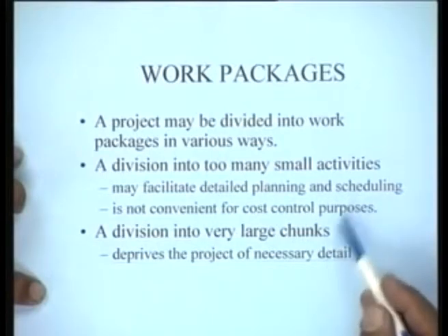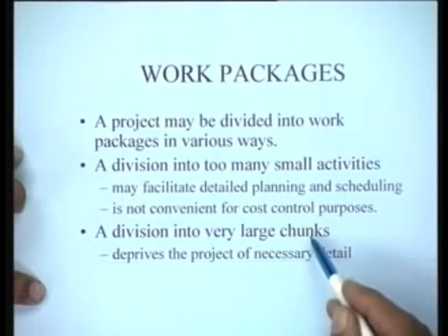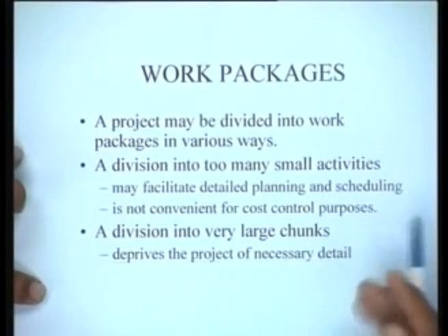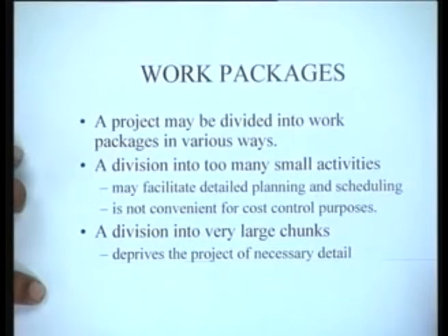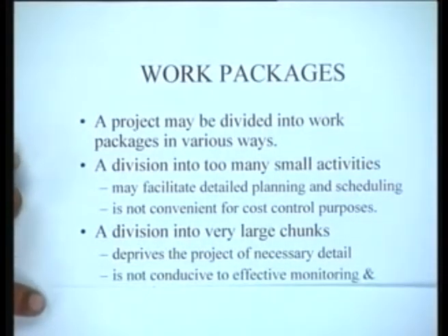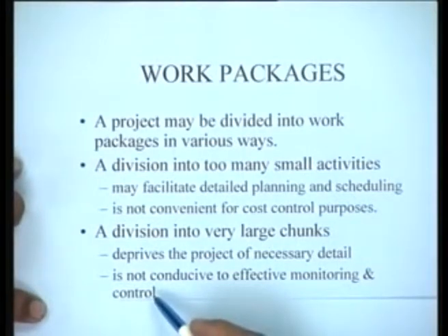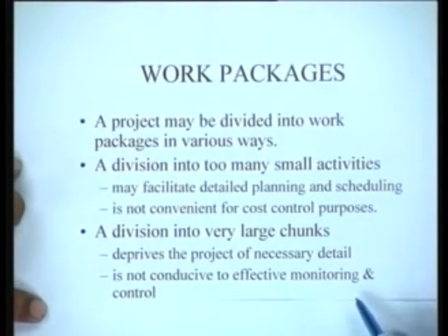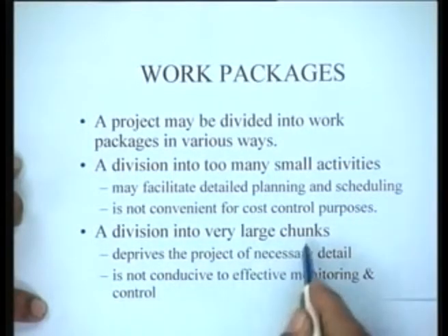On the other hand, a division into very large chunks of work would deprive the project of the necessary detail. For instance, if you do not divide the project at all, it is one project. So, you would be monitoring the project as a project, and you would not know which are the parts of the project which have to be monitored. So, it deprives the project of necessary detail and is not conducive to effective monitoring and control, because there are no stages, there are no parts where you can check. You would like to find out, okay, the project has 15 parts, we will check each part, and at the end of 2 parts we should be able to say yes, 2 parts are over or 3 parts are over. So, in that sense, large chunks also are not useful.